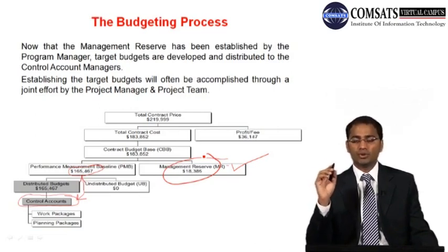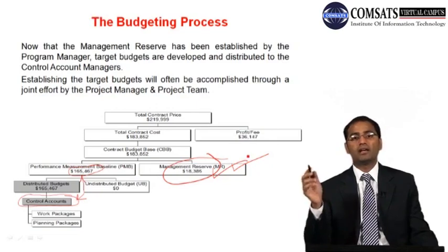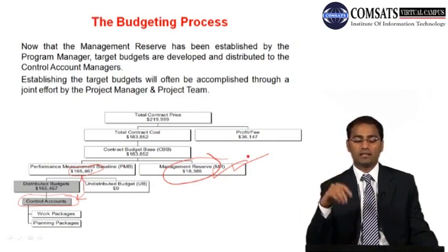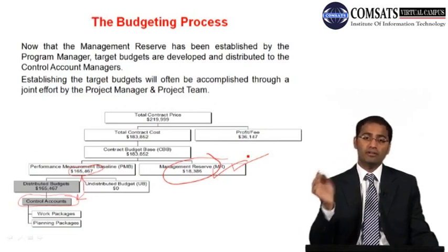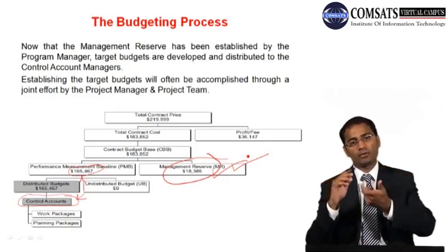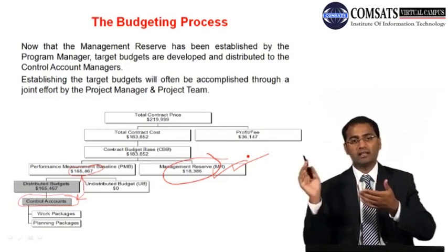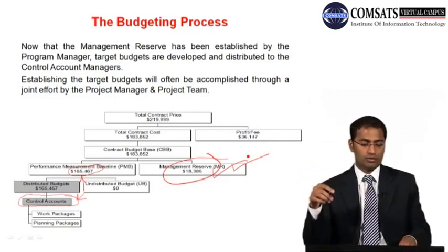The project manager should inform the program manager of this event, and hence should demand extra money well before the time, so that the program manager will utilize this to pay the project manager. This concept is very much aligned with the previous concept we had discussed. If one risk is not actually happening, the money is going back to the program level. The project manager is shedding that thing out of his or her control.